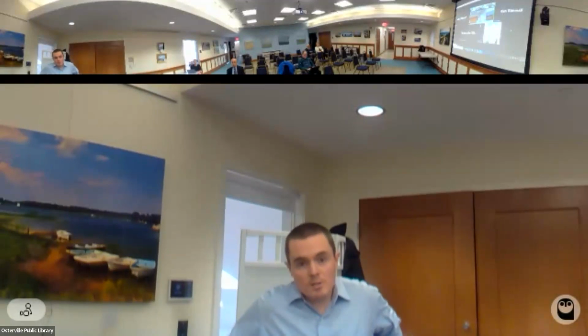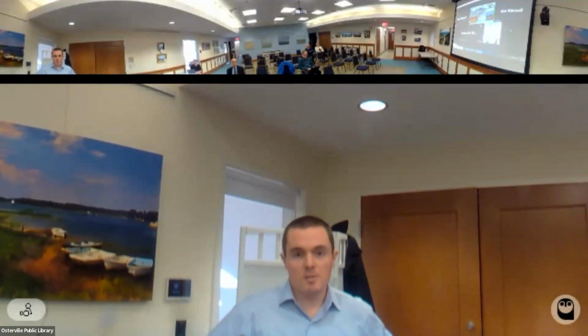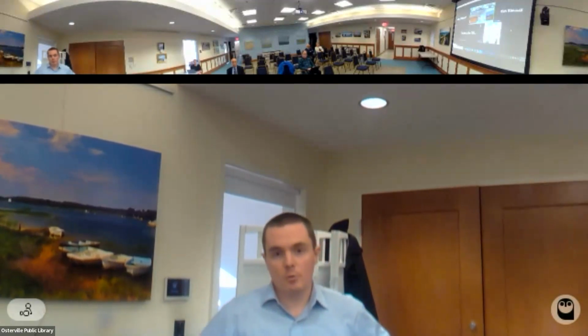So I just want to make a comment. I was down there maybe 2 years ago when the substation was being built. Is that likely to be the time frame? 2 years ago? Yes, for each of these projects, what we're proposing is 2 years of construction during off-season months, similar to what Vineyard Wind did, starting in fall of 21.